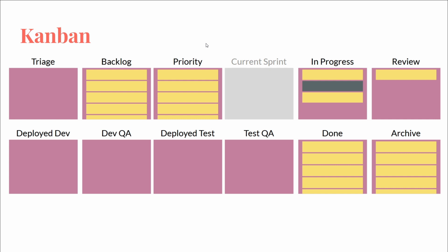And so there, it's more of a focus not on how big the tickets are, but how high priority they are. Is this a thing that needs to be done in the next 15 minutes because prod is down? Is this a thing where it needs to be done in the next hour because some other thing is a major issue? Is this a major client that we need to make happy and needs to be fixed in the next day? Is this something that needs to be fixed in the next 2 or 3 days or the next week or whatever? So you'd put a deadline on it as to when the thing came in and when the latest it can be finished at.